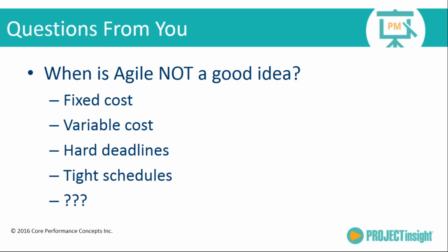I also lean away from it if there are very hard deadlines, and there are pros and cons to this. Let's say you've got a particular thing that needs to be delivered, and it has to be delivered in a month. Okay, all right, fine. In order to deliver in that month, you probably need to take the time and make sure you've got the requirements nailed down.